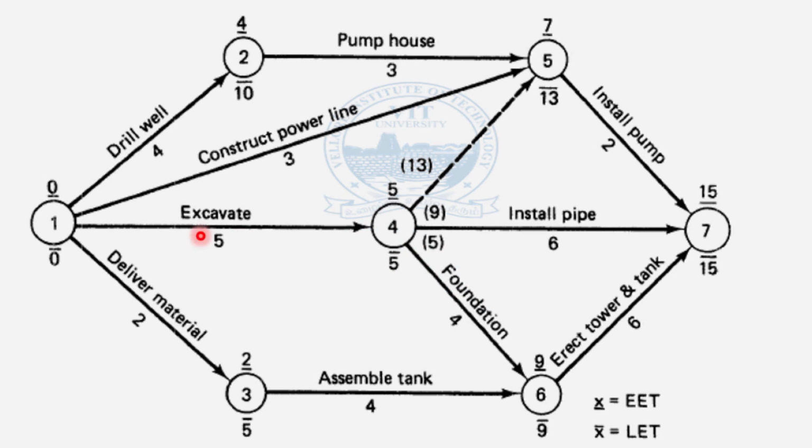Okay, so 5 minus 5, again you will get 0. Then let us look here, 9, no other root is there, so that is why you don't have any brackets. 4, that is 9 minus 4, you get 5. Again you got 5 minus 2, the most critical value is 0. Okay, so you do have 3 on this root, but you got 0 on this root.